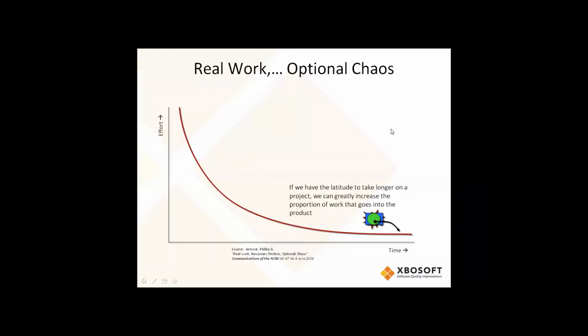And talk a little bit about time compression, going for speed, with this whimsical image of a guy screaming down a racetrack going for speed. We find from the data something that's also correlated to defect rates that is non-trivial, and that's schedule compression. So if you have the liberty of taking a little time and using a smaller team, you tend to have less waste on a job, on a release, and more real work gets done without the chaotic waste of rework and mistakes.